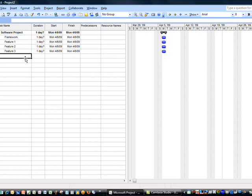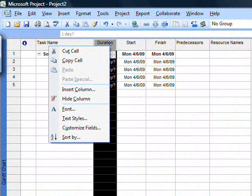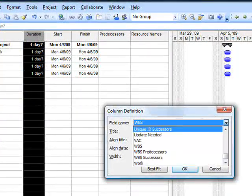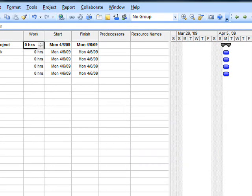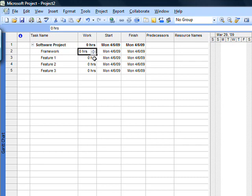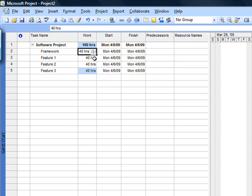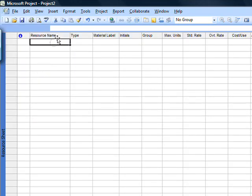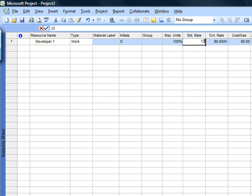Now it's time to put in estimates. I'm not going to use duration — I'm not even going to worry about that field; I'm going to change it. I prefer to use work. We'll build up from work; the duration will be calculated as a result of the hours worked and then the calendars of the resource and the master calendar, so Microsoft Project will build that up for us. There are times when you want to constrain something with dates, but we're going to focus on building up by the hour. Let's add estimates — let's say each one of these consumes 40 hours of work. I need to create a resource for them, so go to the Resource Sheet and add Developer 1, paying this developer $125 a day.